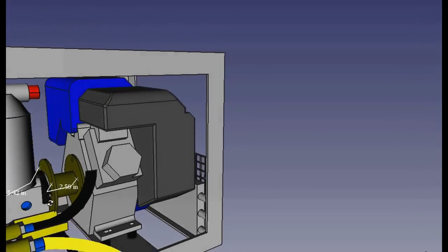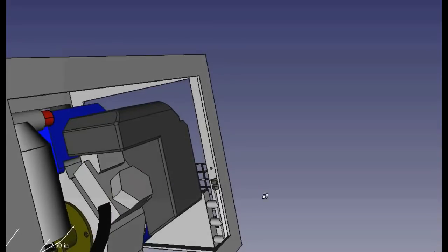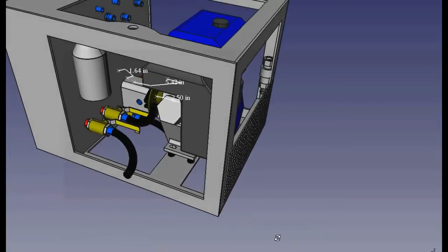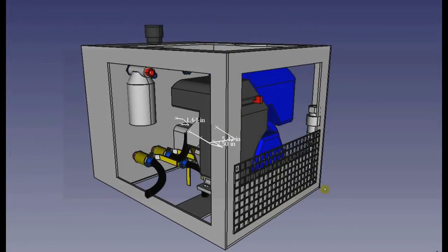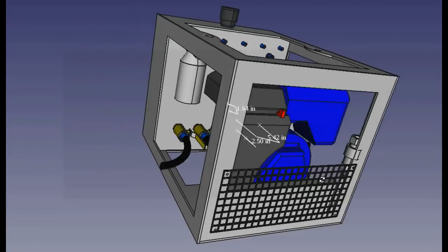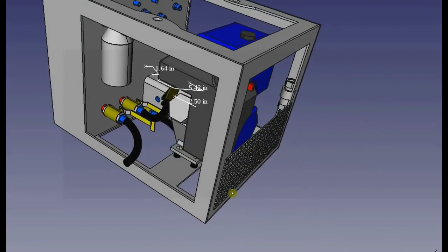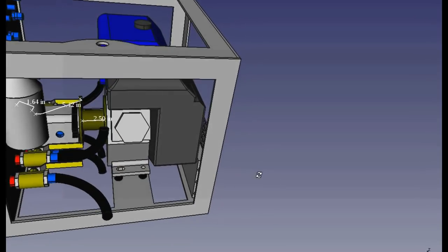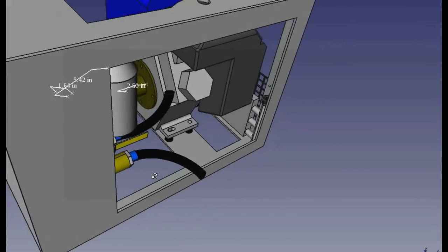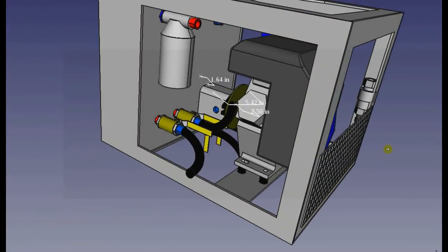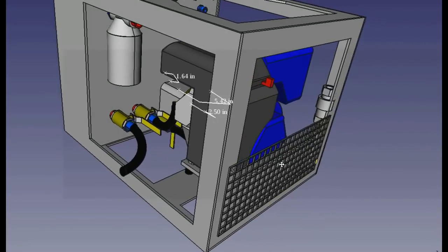There's suction on there, I guess, that was on that CAD from before, and I'll see what. To be certain about what you need there, you have to look at the actual purchasing link for the cooler and find out exactly what fittings it has, so there's no ambiguity about what's supposed to be on the end of it. Because the BOM is complete, right? It's pretty complete. Well, it's more or less complete.